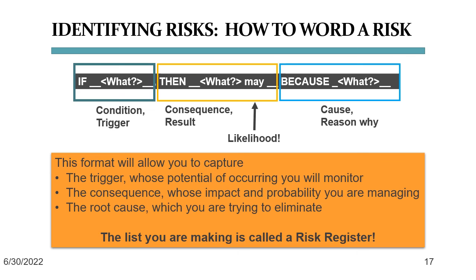Now, here's the important thing. We have to use the helper word may to indicate that there is a probability that the risk may happen. If you use the word will in this place, you are replacing the probability with certainty, those 100%, and you're no longer describing a risk, but a problem. So using may is important. Let's look at some examples.